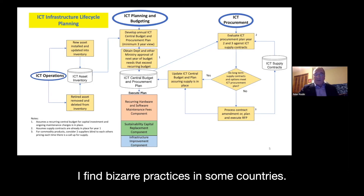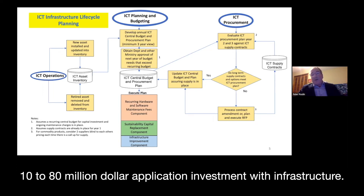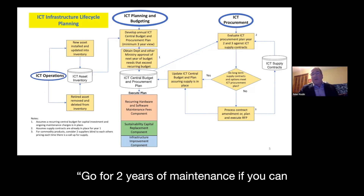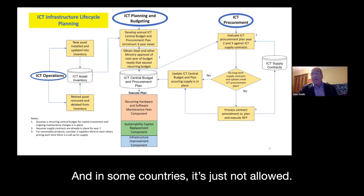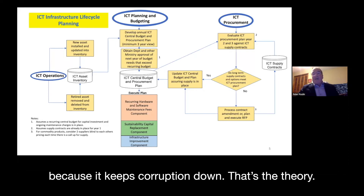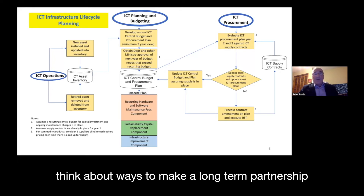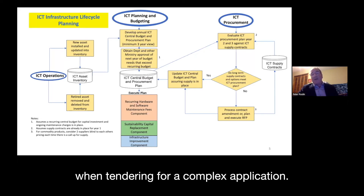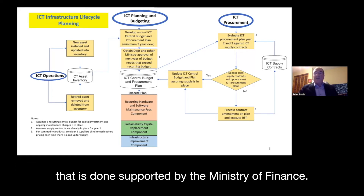I find bizarre practices in some countries. When coaching people on a major IT investment for a new tax solution — which is a 10 to 80 million dollar application investment with infrastructure — the advice is always: go for two years of maintenance in the contract with the vendors, and try to have options for at least five additional years, because the firm that built it knows it best. In some countries this is actually against the law — there's a practice of changing suppliers every two years to keep corruption down. I encourage finding ways to make a long-term partnership when tendering for a complex application.